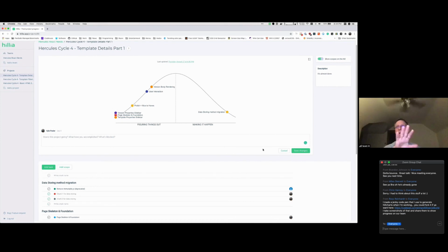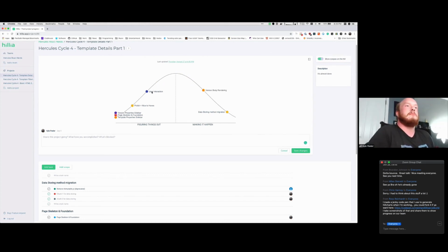So if everything is floating to the top of the hill, but it hasn't really gone over the hill at that halfway point, is that a judgment call for the product owner to say, let's just cut it at 3 weeks and start a new system? You commit at the beginning of your time period. You never pull out of that. You may just have your peak shifted a little bit.